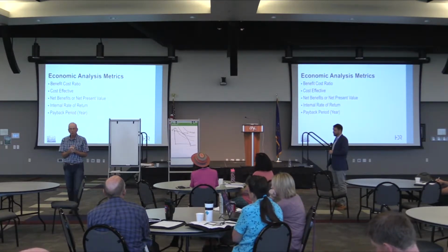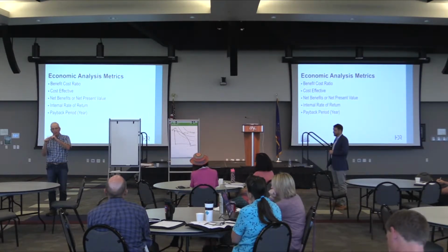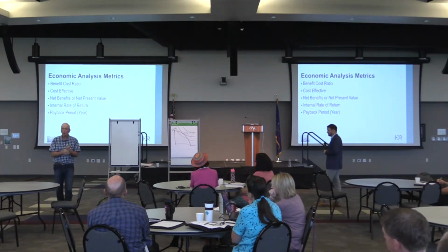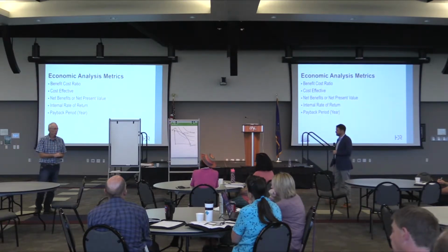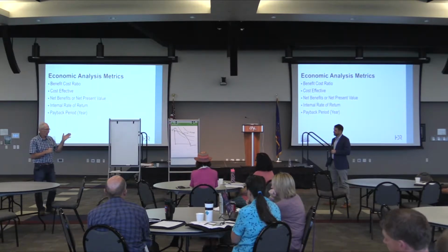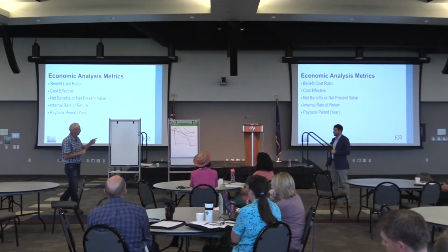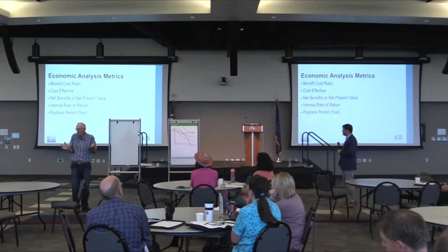Internal rate of return is equating when the stream of benefits equals the stream of costs to see what that discount rate would have been. And the payback period is how long it takes you to get your money back in terms of years of the project. But all of these things, you use basically the same metrics. You figure out one, it's easy to figure out all the rest of them. And there aren't any other ways to measure efficiency.